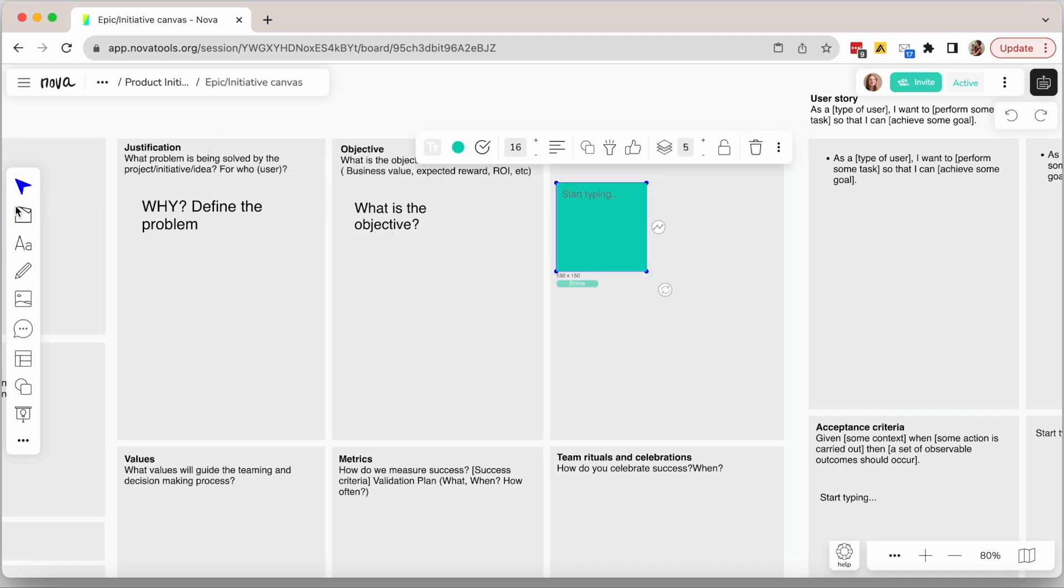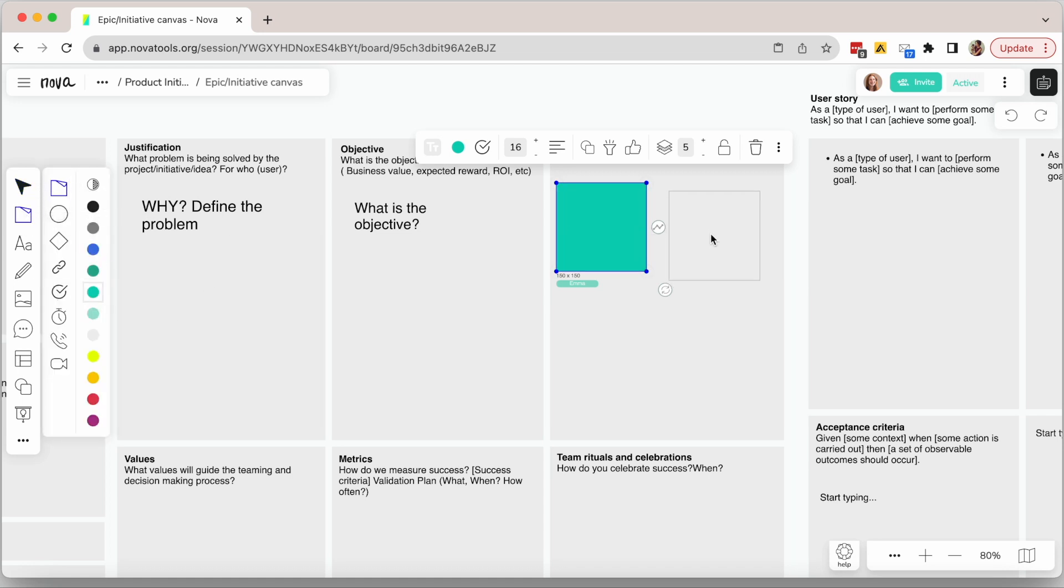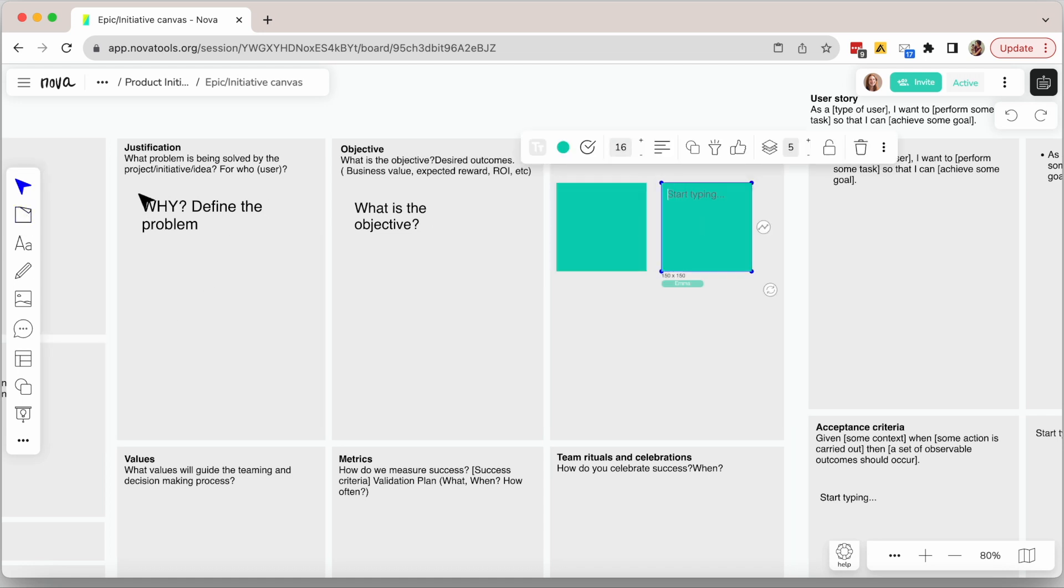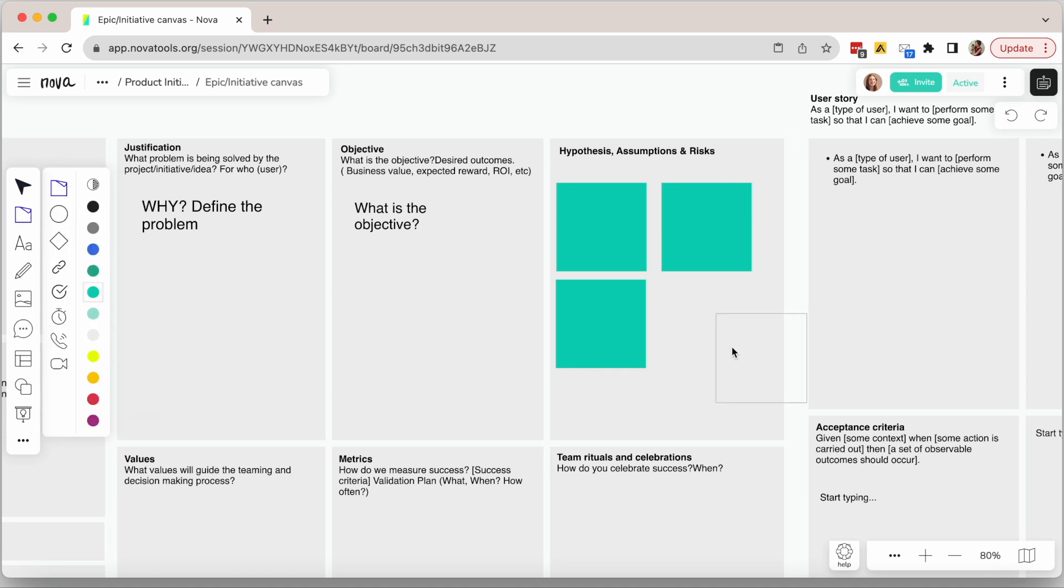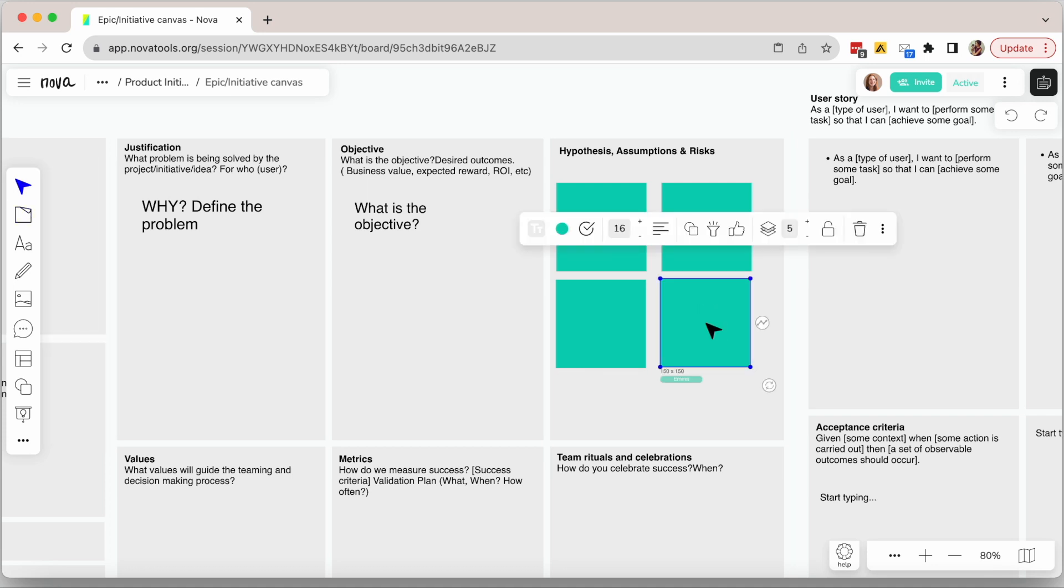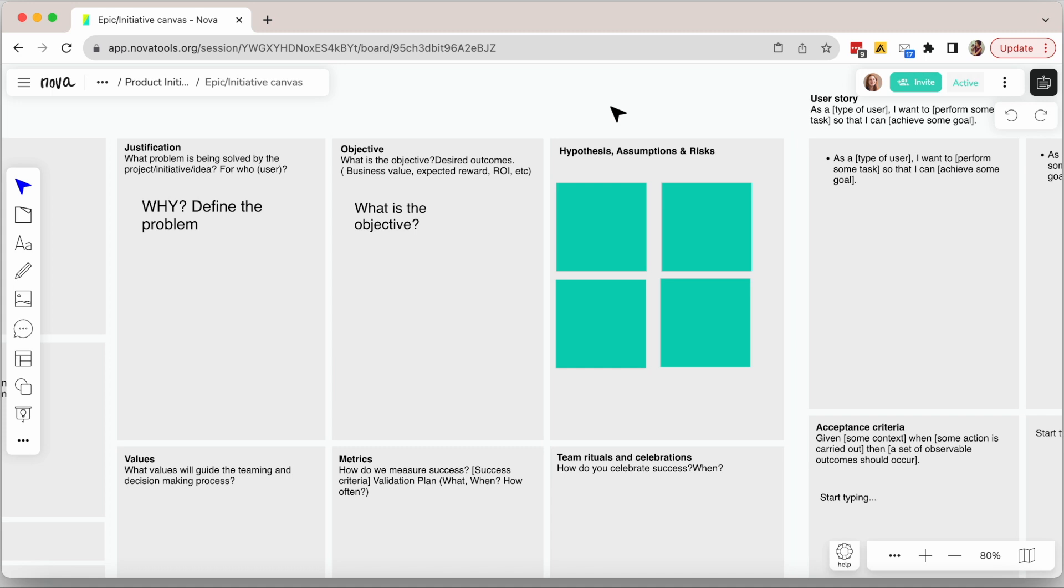After that, define all the assumptions you're making and, if possible, organize it in a way where you put the high risk at the top so you can chat with your team and stakeholders about it or define ways to find additional insights and information to reduce risks. Your research plan should be defined based on this.